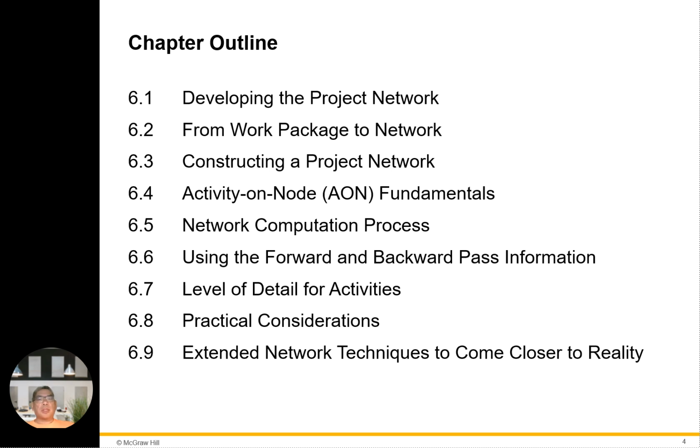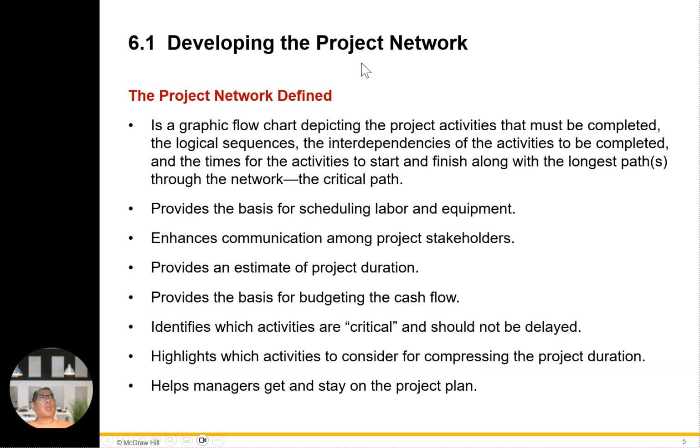Okay, let's discuss this in detail. Defining a project network. The network is a graphic flowchart depicting the project activities that must be completed, the logical sequences, the interdependencies of the activities, and the times for activities to start and finish, along with the longest path through the network, the critical path.